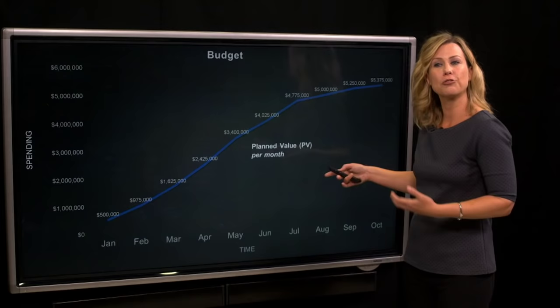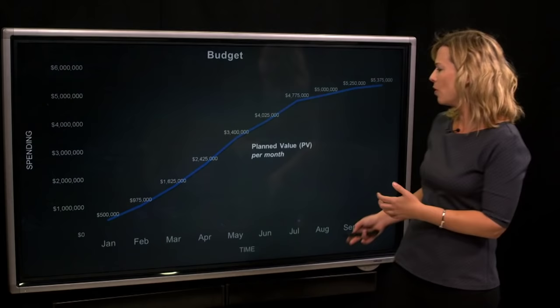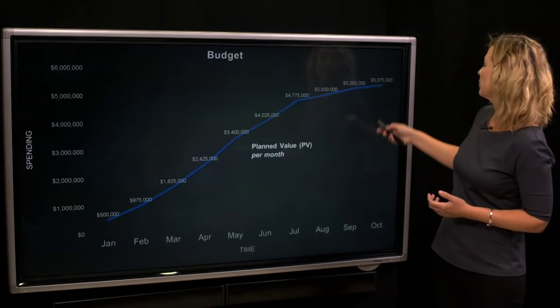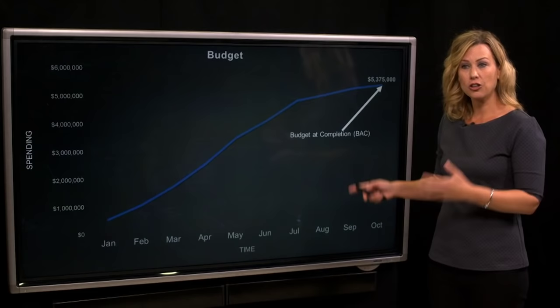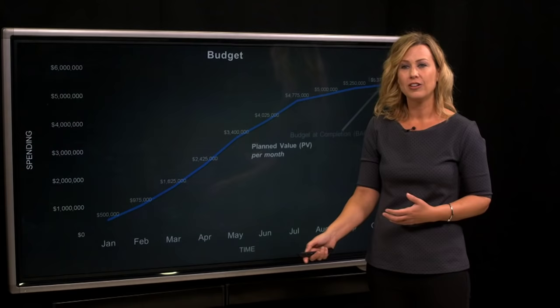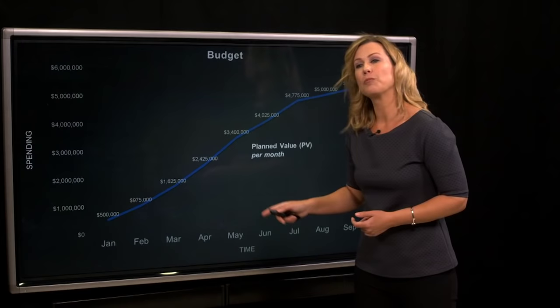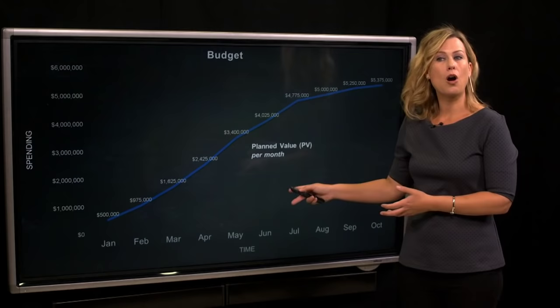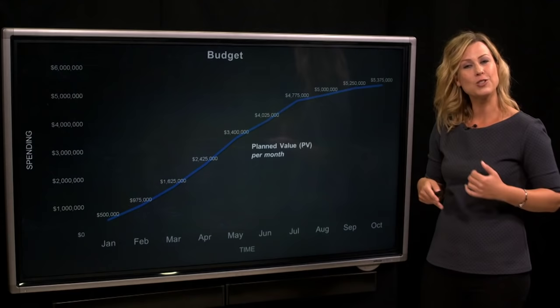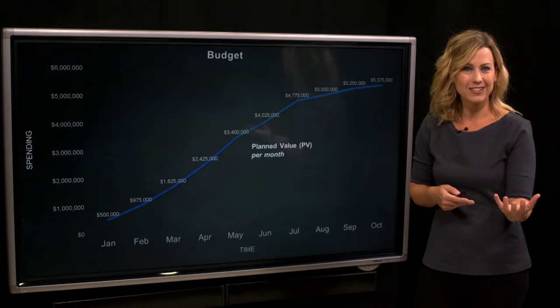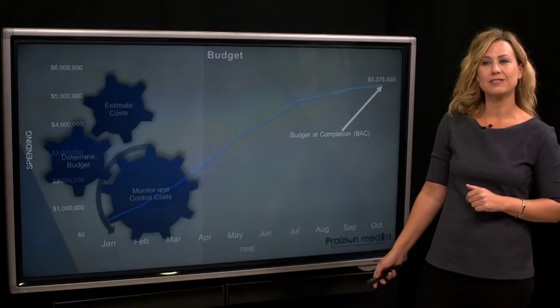This is the planned value in the earned value management world. Here we did it by month because it makes it easier to read and talk to people who don't know anything about your work packages. How much money are you going to spend in January? $500,000. How much money are you going to spend over the whole project? That's $5,375,000 — our budget at completion, our BAC. Each of these numbers is a cost estimate and does include risk reserves. Our contingency reserves are built into our budget at completion, and the project manager has the authority to pay for those identified risks.